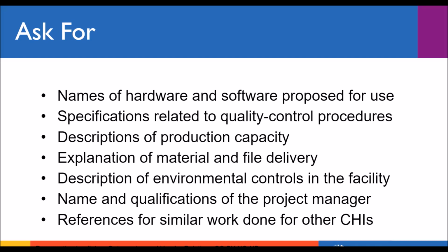You'll also want a description of their environmental controls in their facility, especially, as I mentioned again, if you have moldy material or audiovisual material that needs to be temperature controlled more stringently. They should be able to give you readouts from their PEM monitors over the last year and just be able to verify that they do have control over their facility.